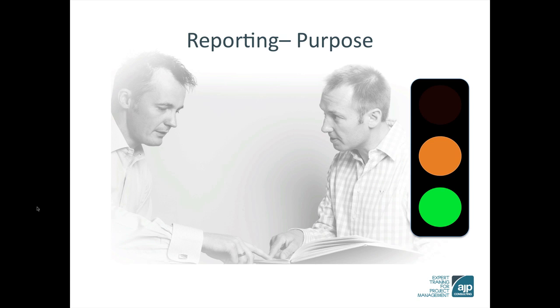If the project was in jeopardy, however, so could no longer deliver in scope, the project would be on red status and it would be reported red along with impact, issues and actions recommendations. Some people may think that the colour paper was a strange choice, but the point is that the reporting approach allowed everyone to focus on providing the right level of information.